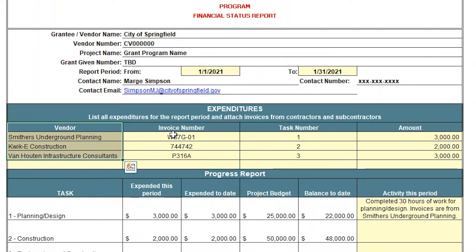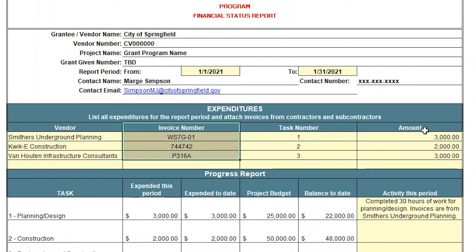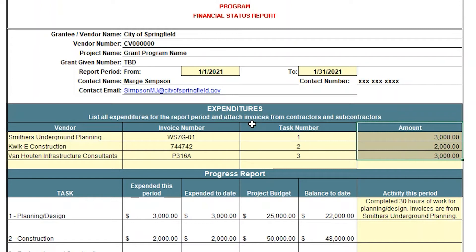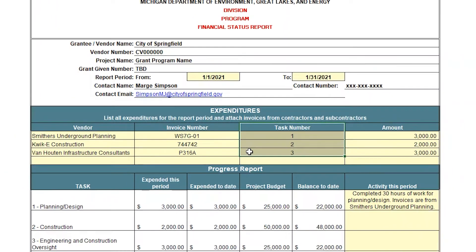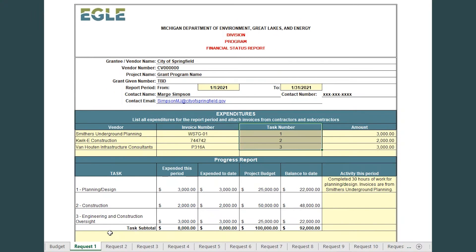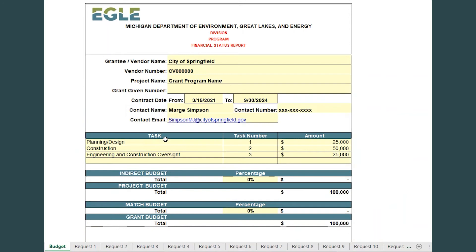Next, input project expenses in the Expenditures section. Be sure to enter task numbers in numeric format. Task numbers are assigned by EGLE during the creation of the Budget tab. Refer to the Budget tab to match your expenditures to the associated task.